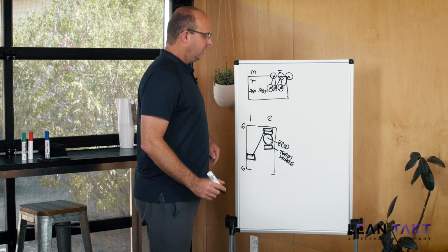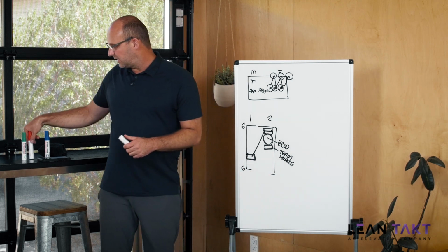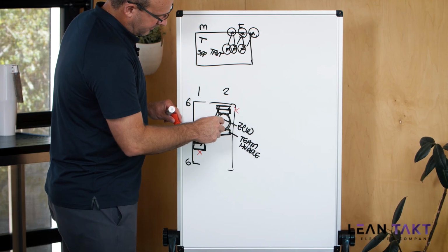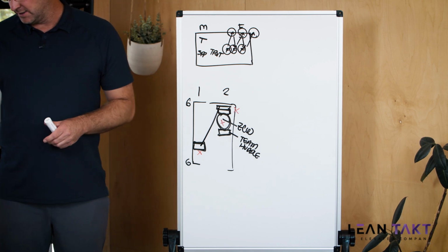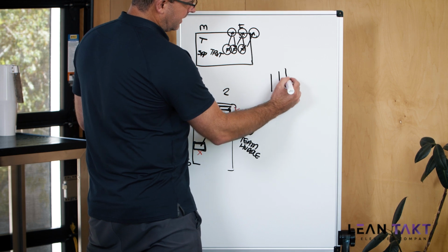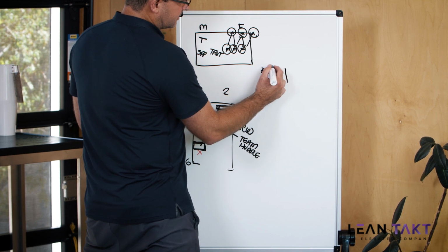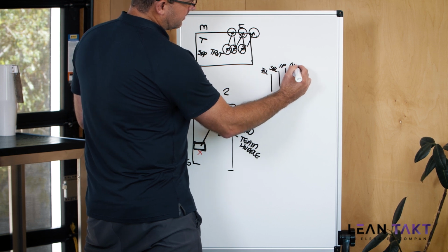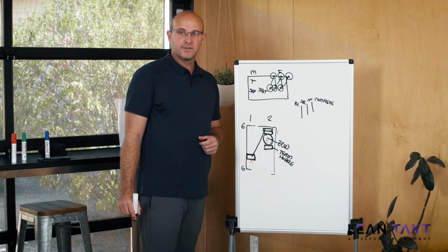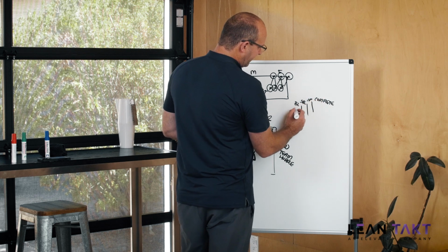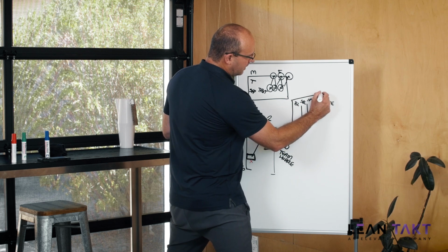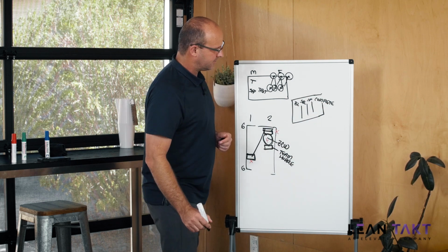Let's visualize that together. What happens is you have gathered any problems from the foreman here, from the workers here, and from your own visual walks here. So you know what problems you have. What you'll do, either virtually or electronically, is you'll have a Scrum board, and this is backlog, sprint backlog, in progress, and complete. If you want to know more about the Scrum process, reference Felipe Engineer's book, Construction Scrum. But you have these different categories here. And you can do this on a whiteboard, a virtual whiteboard, or an actual physical whiteboard out on the job site.